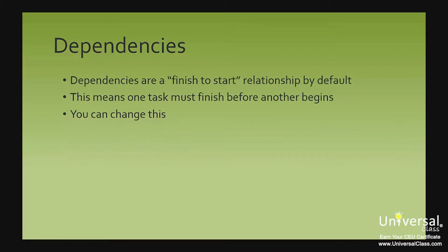Whenever you create a dependency, it is a finish to start relationship by default. This means one task must finish before another begins. If you want that type of dependency, then your life just got a whole lot easier.